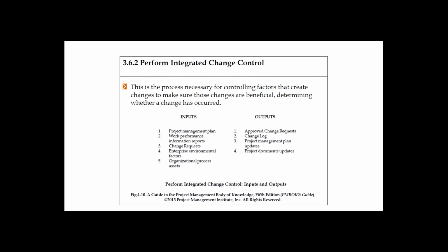Preventive action can be something you realized, like you do risk management frequently, and you identify that there are some outages expected, and it is going to impact 10 days of our work. So we are anticipating well in advance that three months down the line there might be an outage, and we want to change all our plans. That is preventive action. When we take the preventive action, accordingly we need to change all the documents.